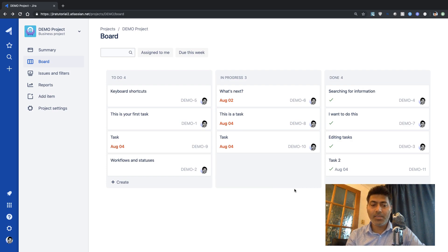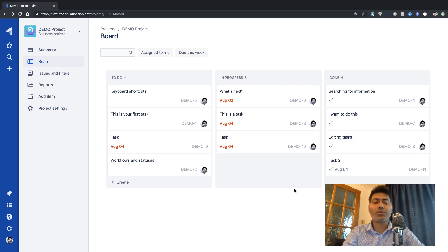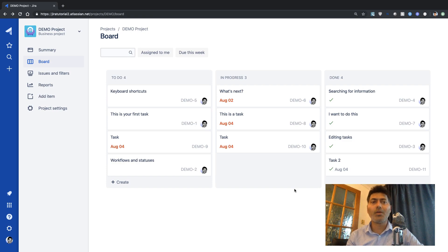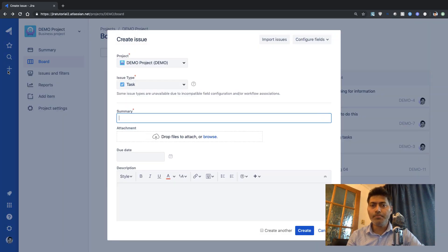Basically when you work on Jira you also have the option to specify the amount of time a specific activity should take. The person who is supposed to work on that particular issue — could be a developer or whoever is assigned — can start logging their time. To use this feature, if you're using a Jira core project, let us create a new issue very quickly.